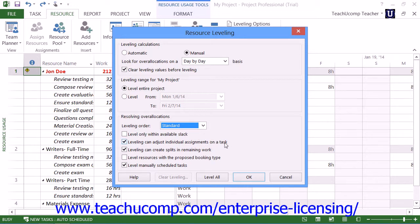You can check the Leveling Can Adjust Individual Assignments on a Task checkbox to allow Project the ability to add leveling delay to individual work resource assignments on a task independently of the other assigned work resources. You can also check the Leveling Can Create Splits in Remaining Work checkbox to allow Project to split a task or work assignment on a task to resolve resource over-allocation.